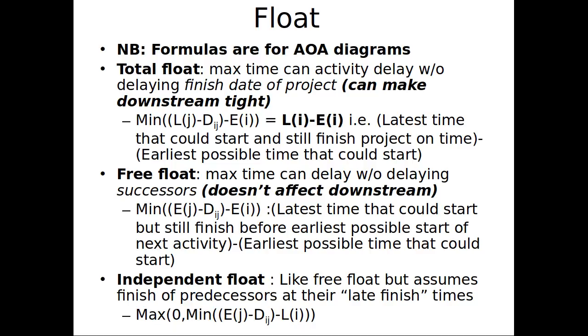If there's a later node which comes in, it may be that free float is different from the total float. Okay. So if there's another dependency that comes in, for example, if you had something like this, or something like this guy here, you might get in a situation where without delaying the whole project, I can delay this by 6 days, but without delaying the next node down, I can delay it by up to 3. And part of the issue is, and this gets very contentious, there are huge lawsuits that take place over float.